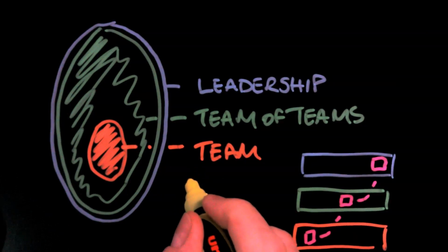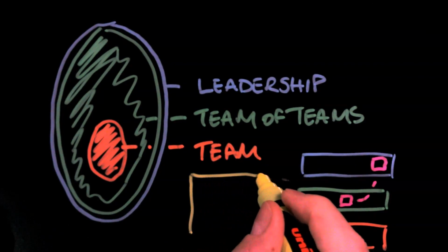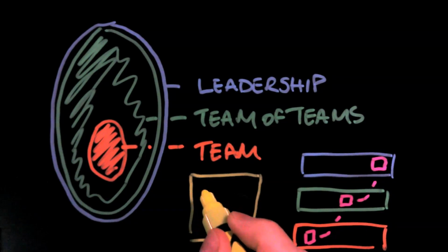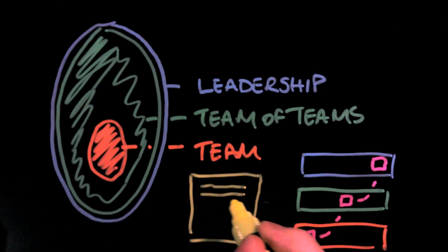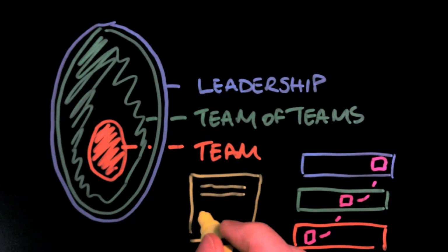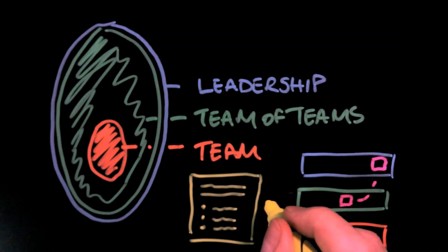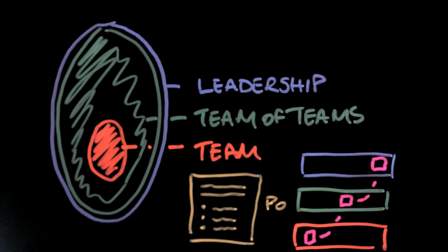Imagine you're in a team and you've raised an impediment, and it's one that's going to be escalated. It's good practice to ensure that your impediment has an adequate description of what the problem is, and the things that you may have done to try and resolve it. But most importantly, and this is super important, have an idea of what success looks like. What is the thing that you're trying to achieve through the impediment removal process? Because as it goes up the chain, you, as the originator, become the product owner, if you like, of this impediment.